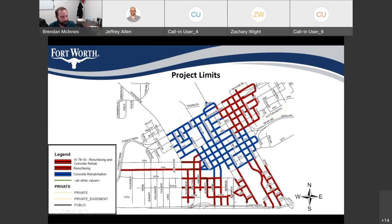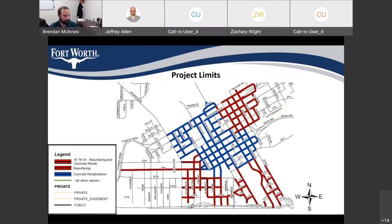The project limits — we'll go into this a little bit more in depth — but it will be a majority of central downtown. The blue area will be the areas where we're doing concrete rehabilitation work. The red areas will be areas where we're going to be doing resurfacing of the roadways.